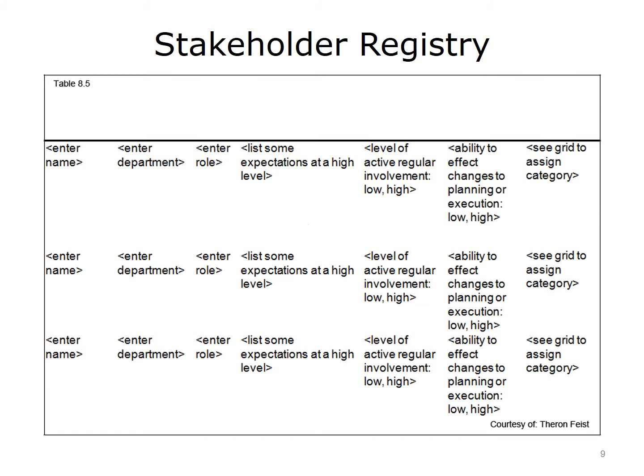A stakeholder is defined as anyone who stands to be impacted by the operations and deliverables of your project. The Identify Stakeholders process pinpoints anyone or any institution with a potential effect on the project. These stakeholders may consist of clients, project staff, or consultants. Stakeholder analysis graphs stakeholder interest along the x-axis and the stakeholder power along the y-axis.